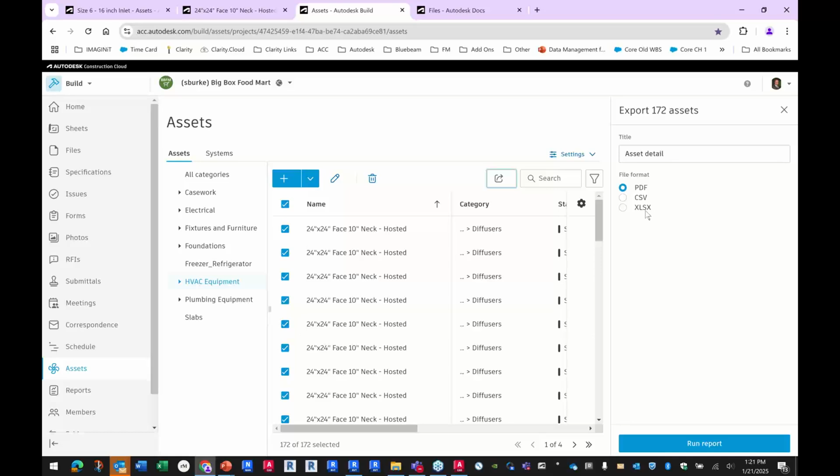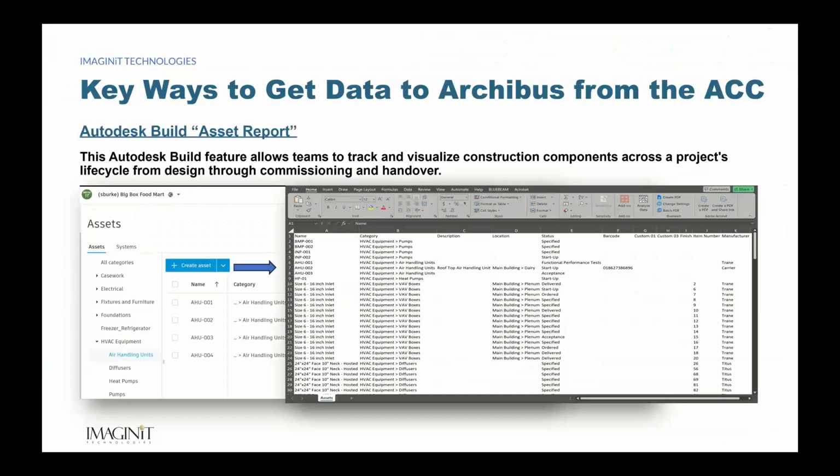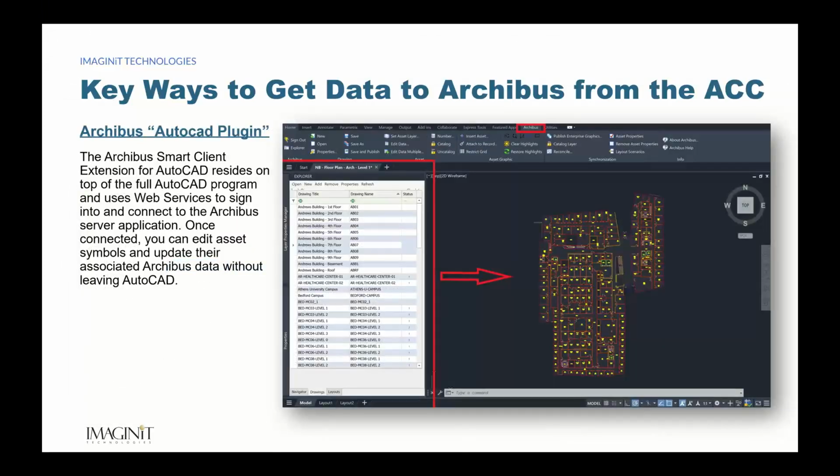So the as-built will gather all the data about the project, with the exception of assets. Assets is separate. You come in here, you get this information, but all the other supporting documentation is going to be in the files. That could include warranty information, maintenance information that was attached to the equipment, it's all there. So I've done that now. I've gotten that information out, but you know, I have an AutoCAD file.